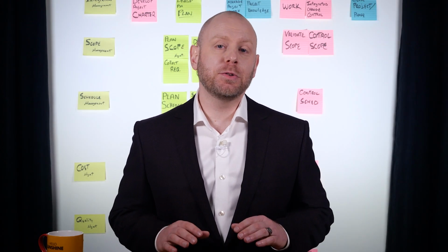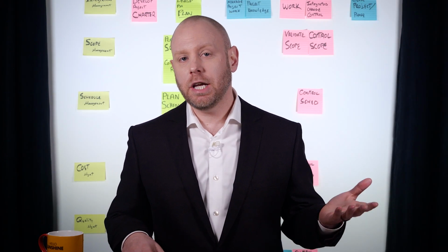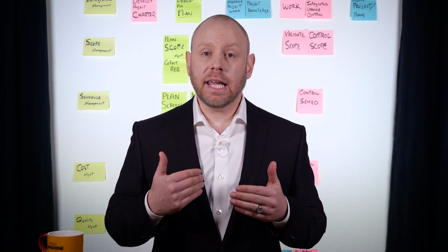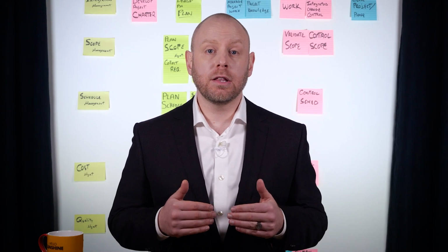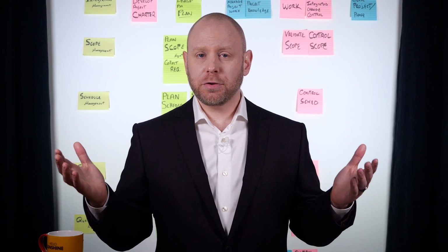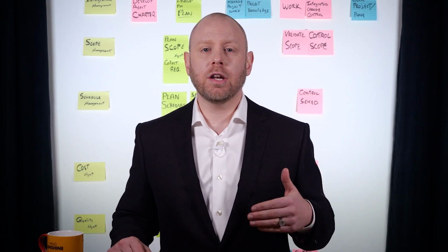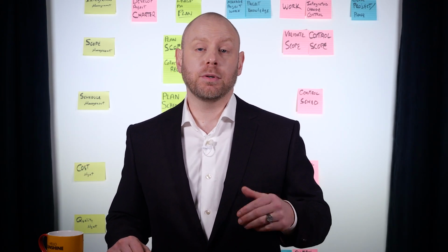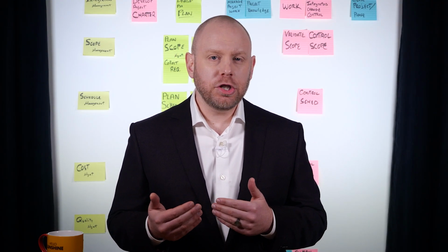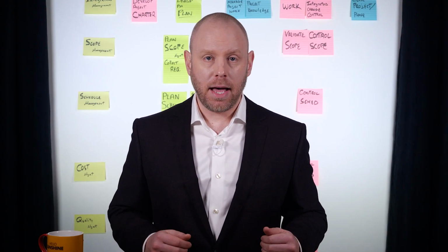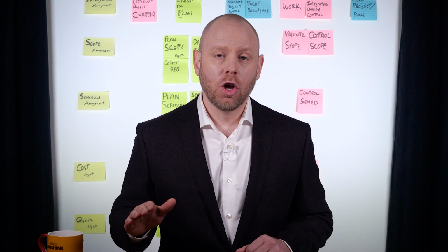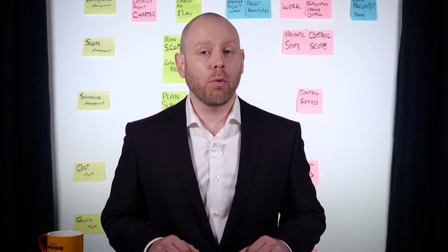In the context of opportunities, we apply some of the same strategies, just in reverse. Instead of avoid, we'll exploit. Here we hope to proactively capture the benefit of an opportunity by increasing the probability of it occurring. Instead of transfer, we share. We transfer ownership of the opportunity to a third party that enjoys some of the benefit if the opportunity occurs. Instead of mitigate, we enhance. A strategy to increase the probability and impact of the opportunity. And of course, we still accept the opportunities with no action taken or escalate by having the program or portfolio manager manage these outcomes.